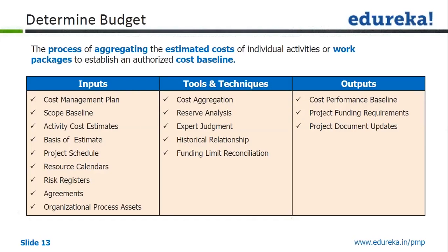Determine Budget is the process of aggregating the estimated cost of individual activities or work packages to establish an authorized cost baseline. When I hear this word, I want to show you the cost baseline so that we are very clear what it is, and then we'll come back and talk about Determine Budget.